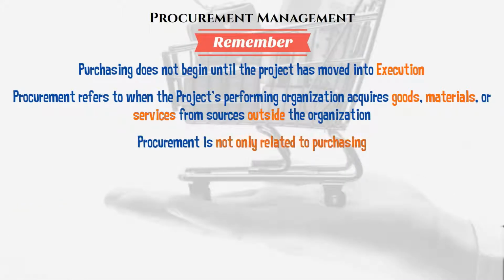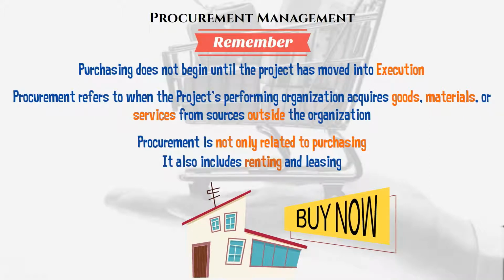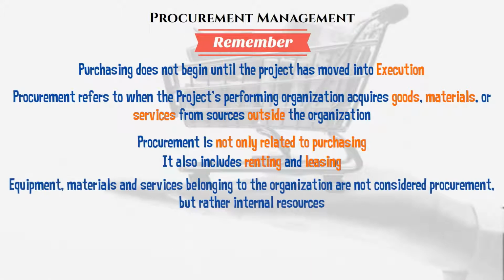Procurement is not only related to purchasing. It also includes renting and leasing. Equipment, materials, and services belonging to the organization are not considered procurement, but rather internal resources.